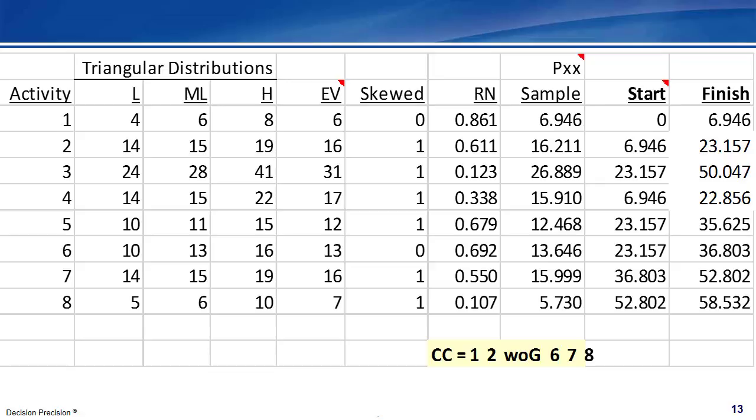The right columns have formulas for activity start and finish times. The calculations are very similar to critical path method. The formula logic is from the precedence relationships in the work breakdown structure. The finish to start relationships are also clear in the activity network diagram. The only addition is recognizing that an unavailable resource can delay the start of the next activity for that resource.